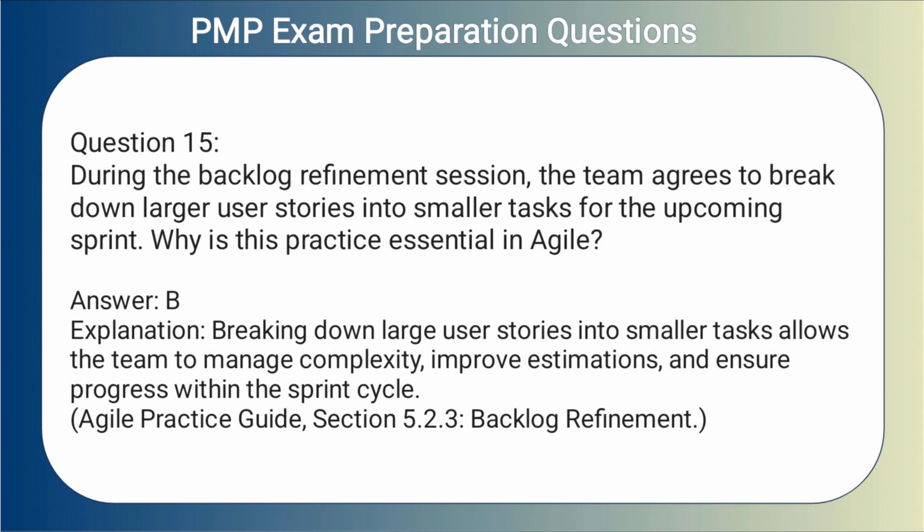Answer: B. Explanation. Breaking down large user stories into smaller tasks allows the team to manage complexity, improve estimations, and ensure progress within the sprint cycle.